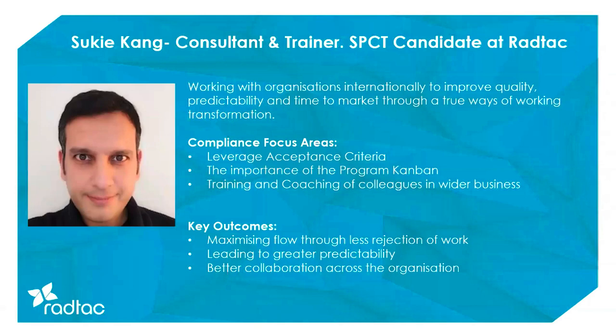Compliance, security, and others can also be really helpful when teams are reviewing and updating their definitions of done as well. And this, once again, just ensures that when the teams perform work, they have full knowledge of all the hurdles, effectively, for want of a better word, all the hurdles that they must jump over to have that work accepted at the end of the process.